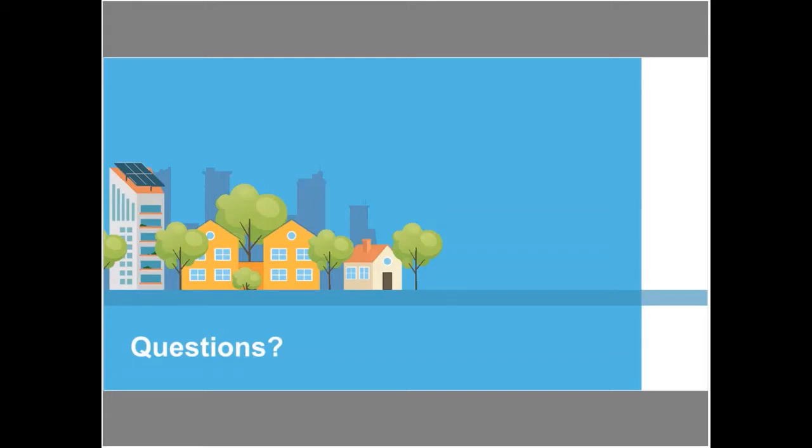We also mentioned the flags for projects that are 90 or 30 days out from an involuntary termination from missing that. And of course, the key point is that there is the possibility of a 1-year extension, but the PJ would need to request that extension prior to that 4-year project completion deadline having passed. So it adds to the importance of making sure that you understand what the status of those projects are so that you can make that request.